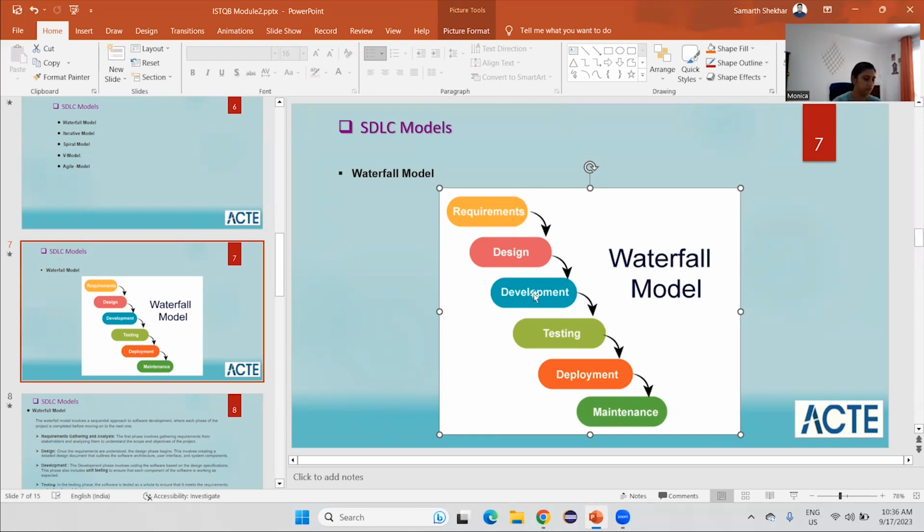What if they had hired developers in the beginning? Then it is going to cost them. So to save cost, they will hire the developers at this particular phase. Similarly, they will establish a testing team after this phase, and after that the deployment, which is again a combination of the testing team and everyone involved, and at the end the maintenance team will be there.